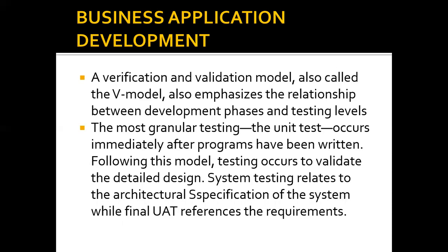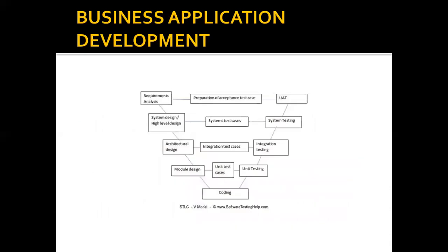All right. An improvement or adaptation of the waterfall model, which is advocated for by software testers, is the verification and validation model. The emphasis here is that once you are in a stage, test. So you don't wait until the end, when they are finished developing the software, to try to find where the problems are. No. As you are finishing the stage, test it. And that is what the verification and validation model is all about.